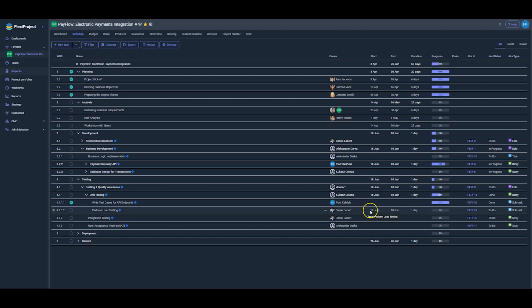However, if we change the schedule, for instance by setting the task to end in August, we will see the start date adjust to July 18th and the end date to August 21st. Parent tasks and project phases will automatically pull their dates from the underlying subtasks. This is how we build the entire schedule structure.